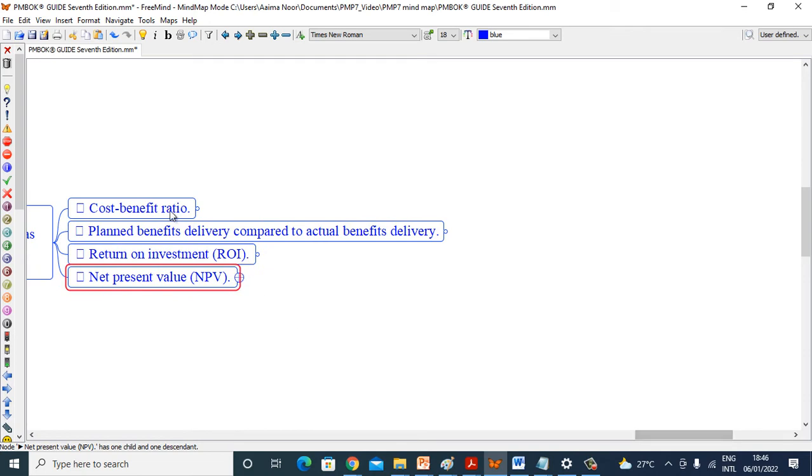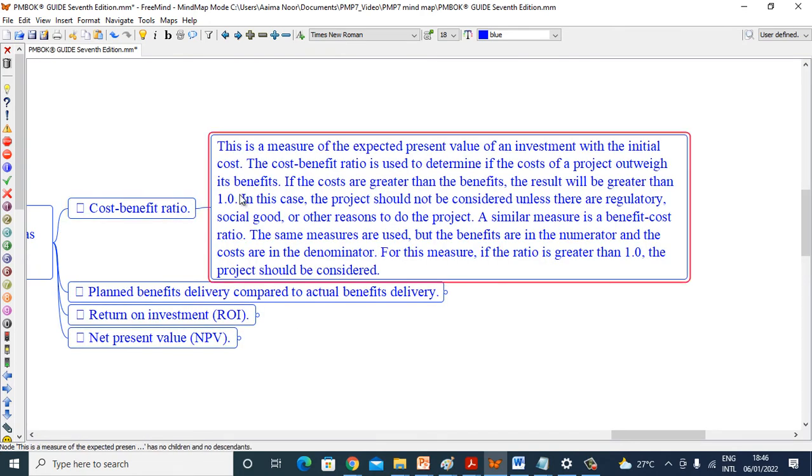So let's see the first, cost-benefit ratio. This is the measure of expected present value of an investment with initial cost. The cost-benefit ratio is used to determine if the cost of the project outweighs its benefit. If the costs are greater than the benefits, the result will be greater than 1.0. In this case, the project should not be considered unless there are regulatory, social good, or other reasons to